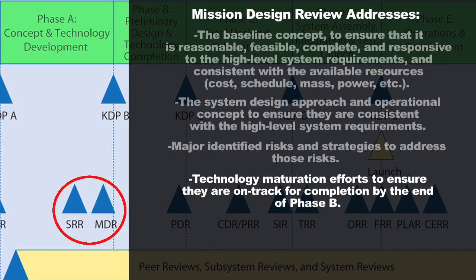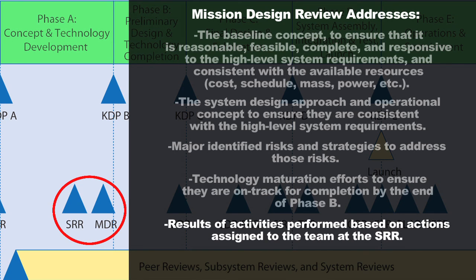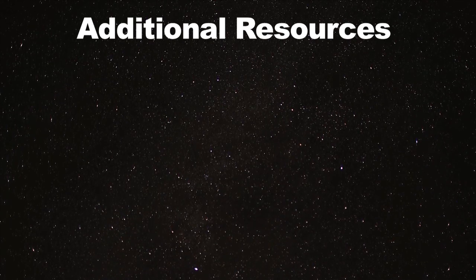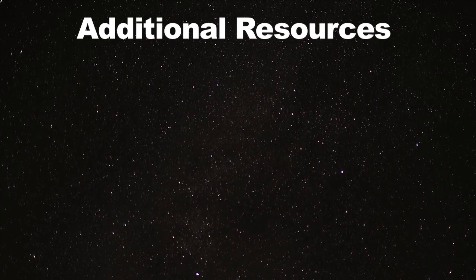You're also going to look at the technology maturation effort. Deeper into Phase A, the review team wants to know if everything is on track and your technology plan is executing as planned, so that by the end of Phase B your technologies will be mature and ready for flight and implementation. Finally, you'll look back at the System Requirements Review and verify that any actions assigned by the technical review team have been completed and closed out.